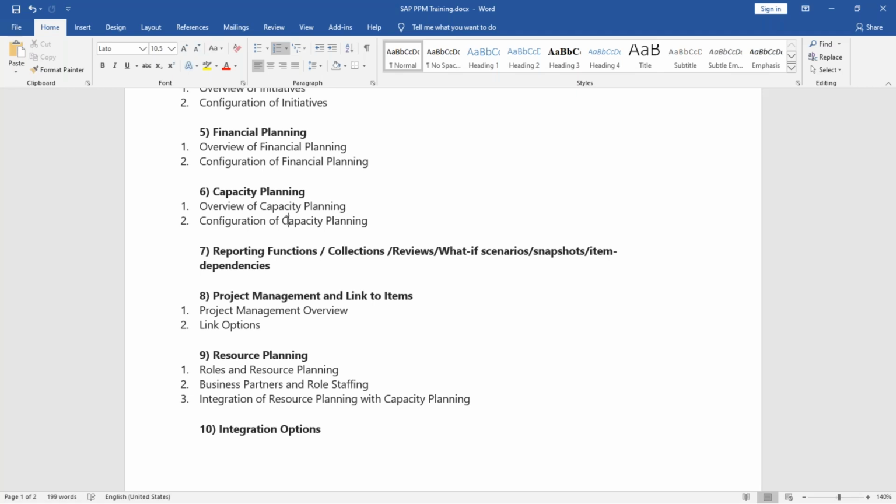So it's just like item is all about mainly planning, and project is about execution. Whatever the actual staffing and resource planning will happen here, that cost will roll up to the actual cost part of your item automatically. And there you can compare at item level what was your planned and approved budget, and then what actual cost has occurred.